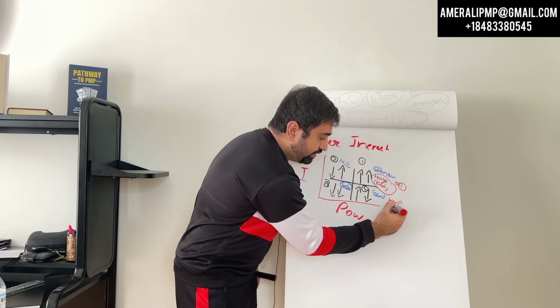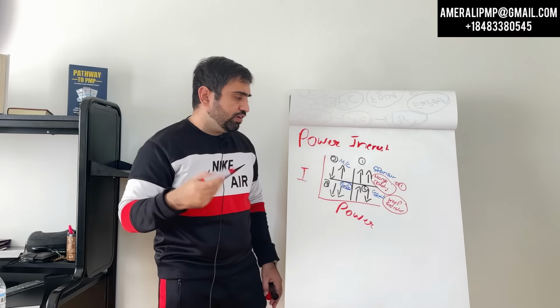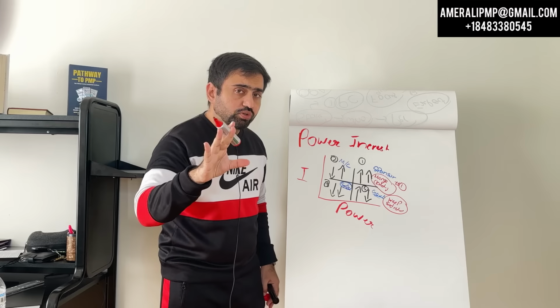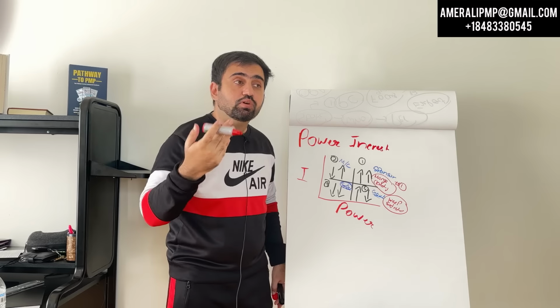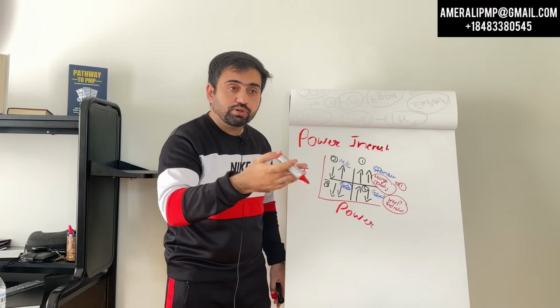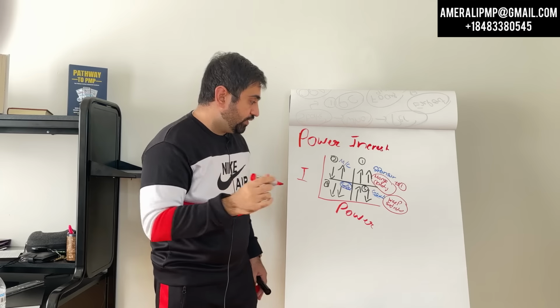Then these stakeholders who have high power but are not interested, I need to keep them satisfied. However I want to satisfy them, that's up to you, but you make sure that they are satisfied. If they need a report after 6 months, after 1 quarter, keep them satisfied. They are a very important stakeholder.